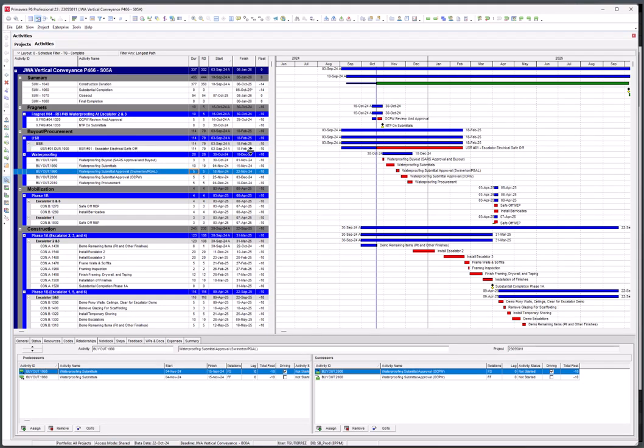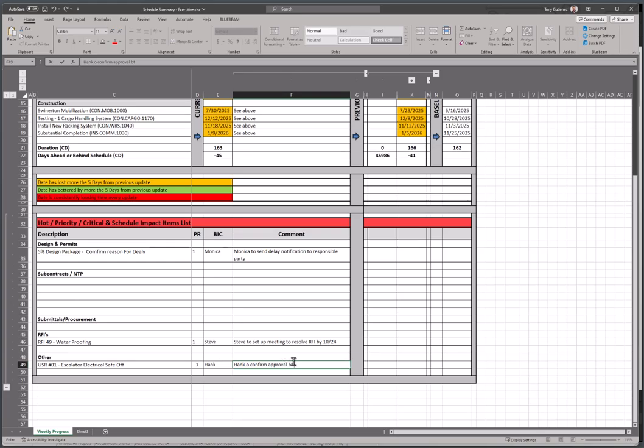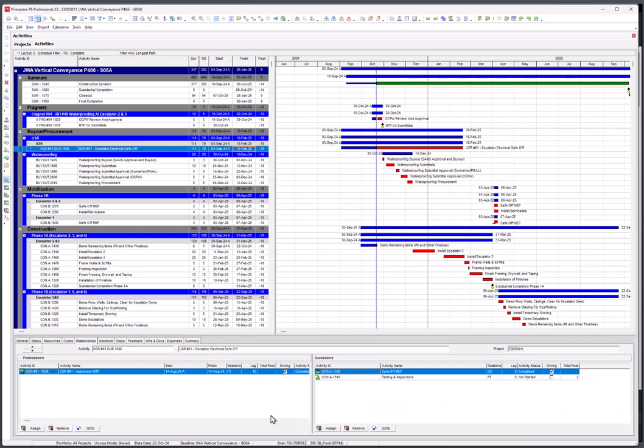He's tracking that to be approved by February 18th, right? So ideally, if he can beat that date, we can recover that -10, right? Ideally, we want that to happen in late January. That way it's off the longest path or the critical path. So I'll confirm that by, let's say, 1/31 if possible, right? So this is where you start assigning all the things that are affecting you, right?